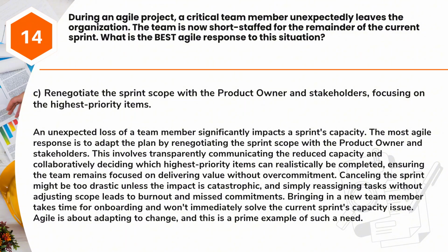Canceling the sprint might be too drastic unless the impact is catastrophic, and simply reassigning tasks without adjusting scope leads to burnout and missed commitments. Bringing in a new team member takes time for onboarding and won't immediately solve the current sprint's capacity issue. Agile is about adapting to change, and this is a prime example of such a need.